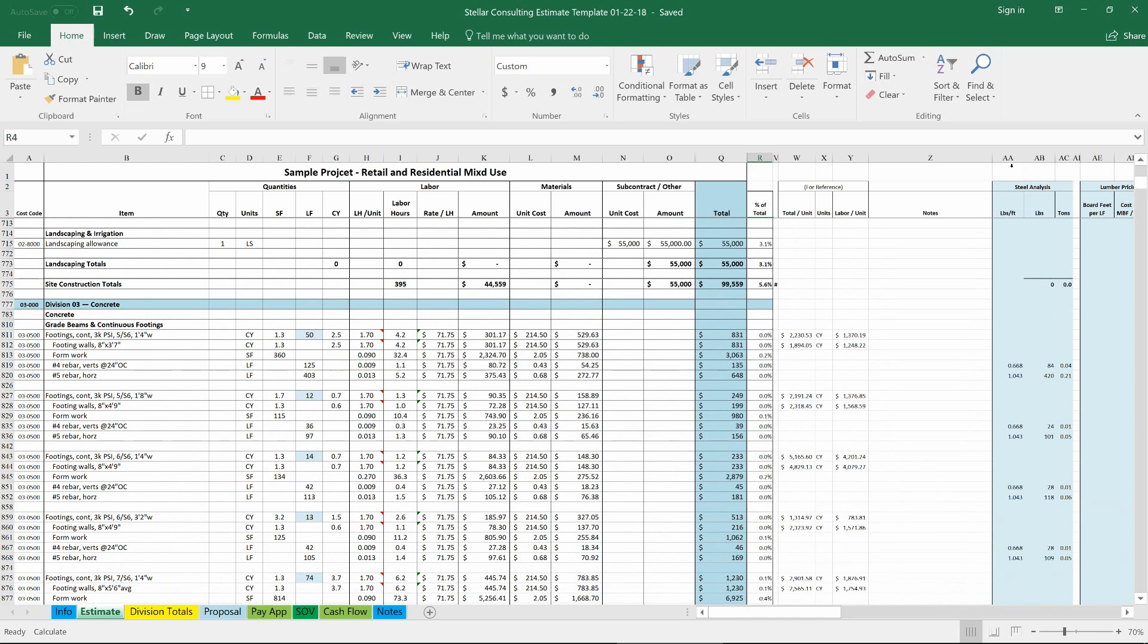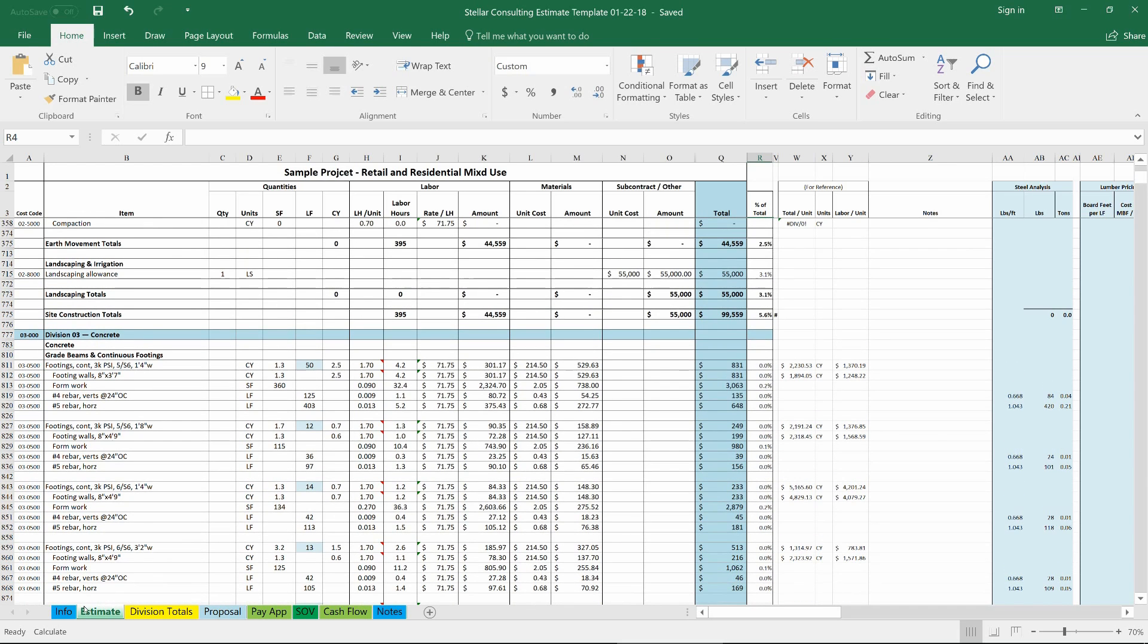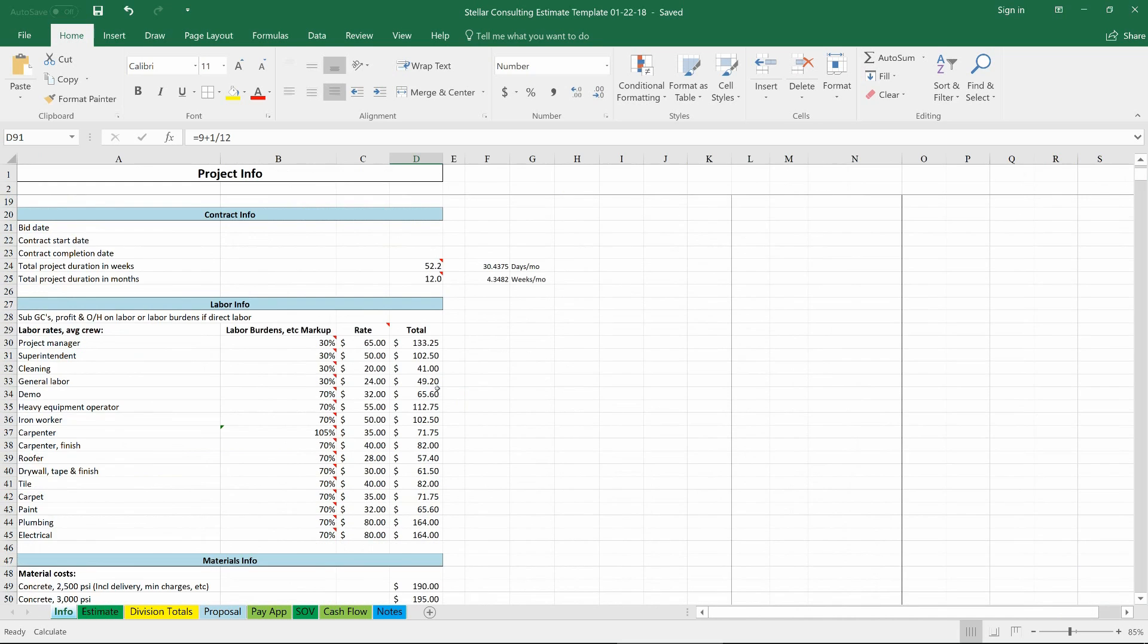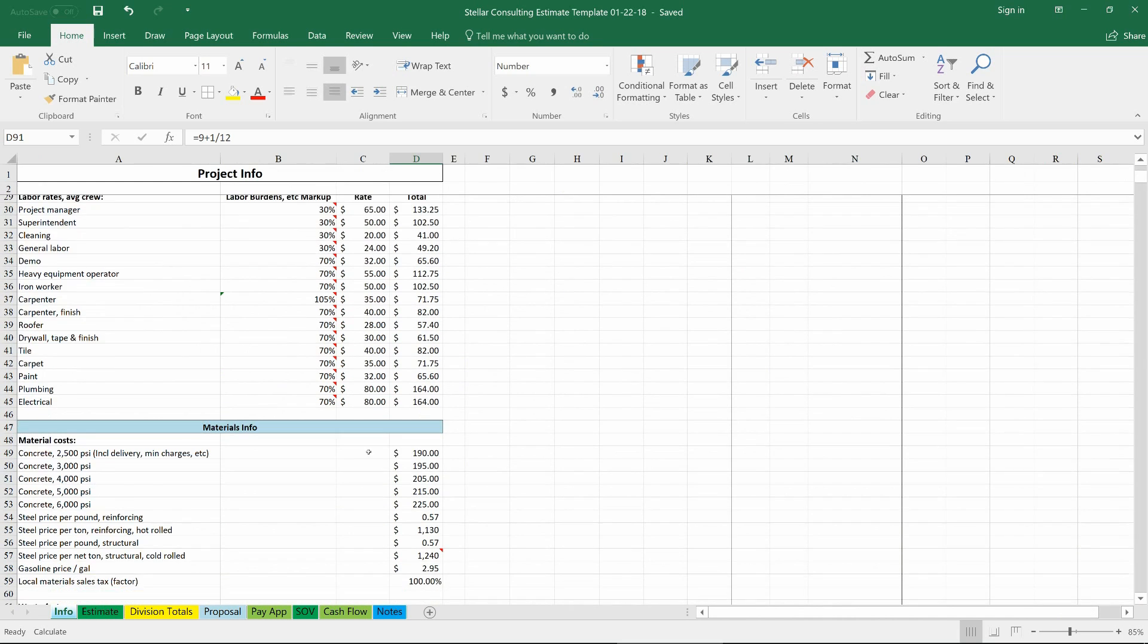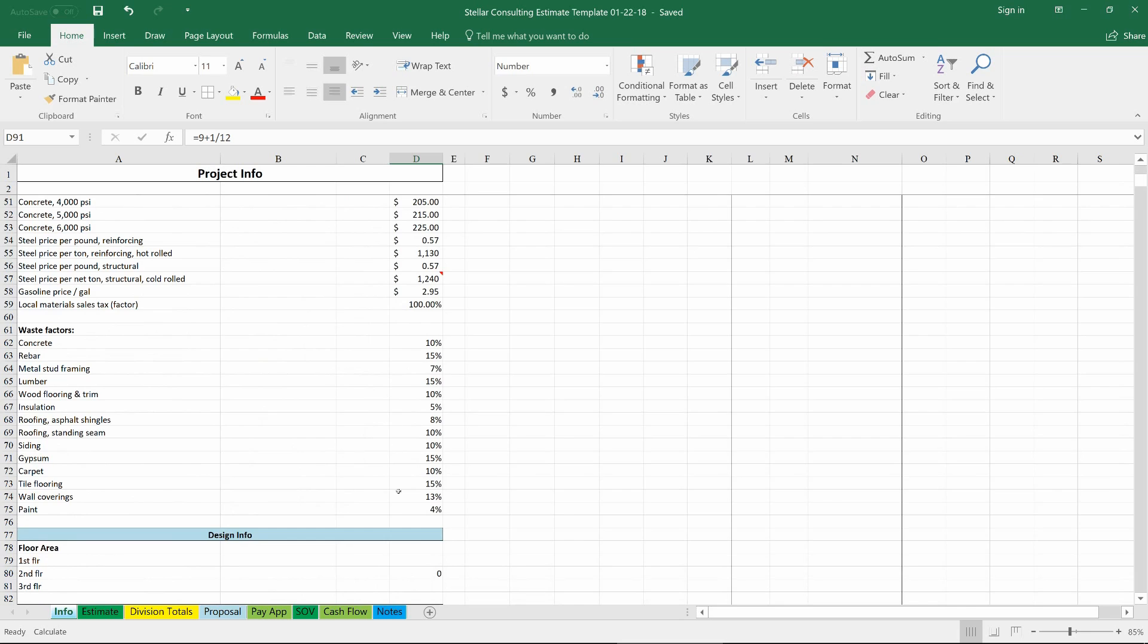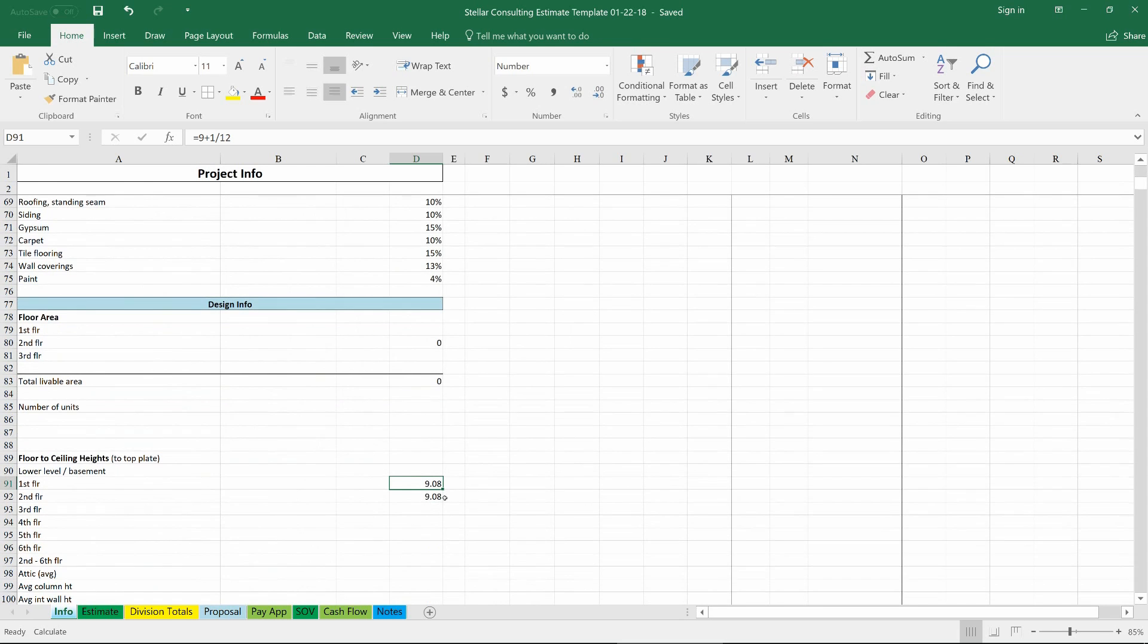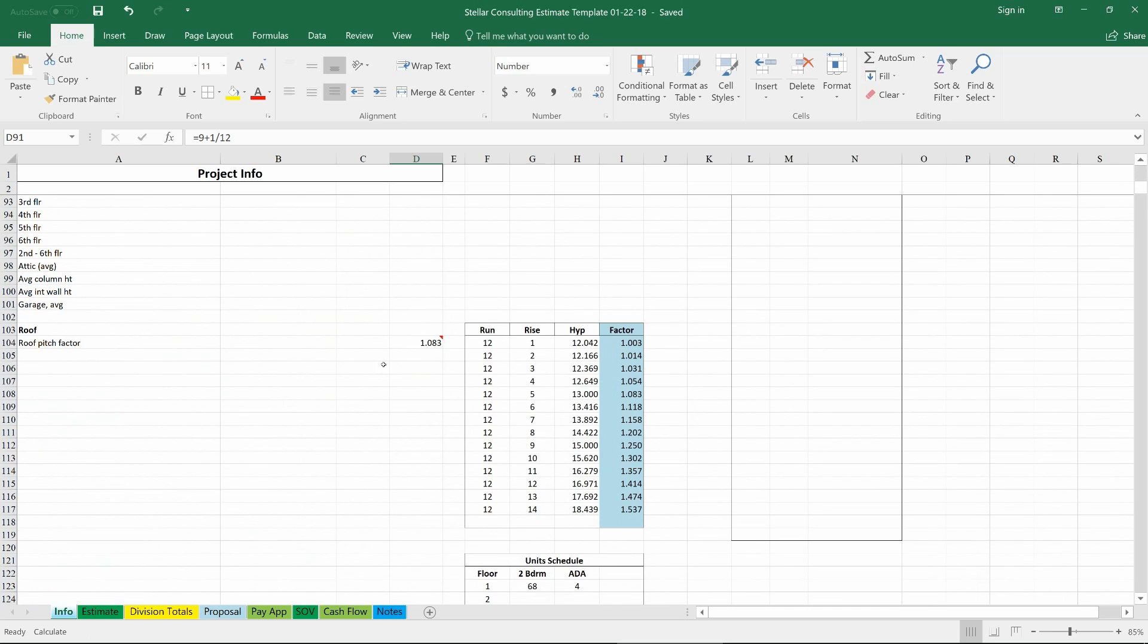Like I said, there's a lot of additional information in hidden cells here, but to quickly and briefly go through it, we could look at the info tab that everything is driven from, from labor rates to waste factors, ceiling heights, roof pitch factors even.